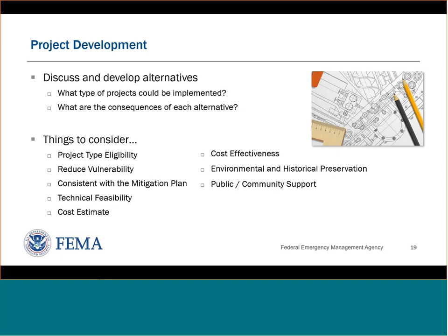Is it cost effective? We'll get into that a little bit today, but take a deeper dive on cost effectiveness next week in our webinar, so please come back for that. Essentially, the bottom line for a project being cost effective is you would need to demonstrate you're going to save at least $1 in a reduction of damages for every dollar that you spend on the project.